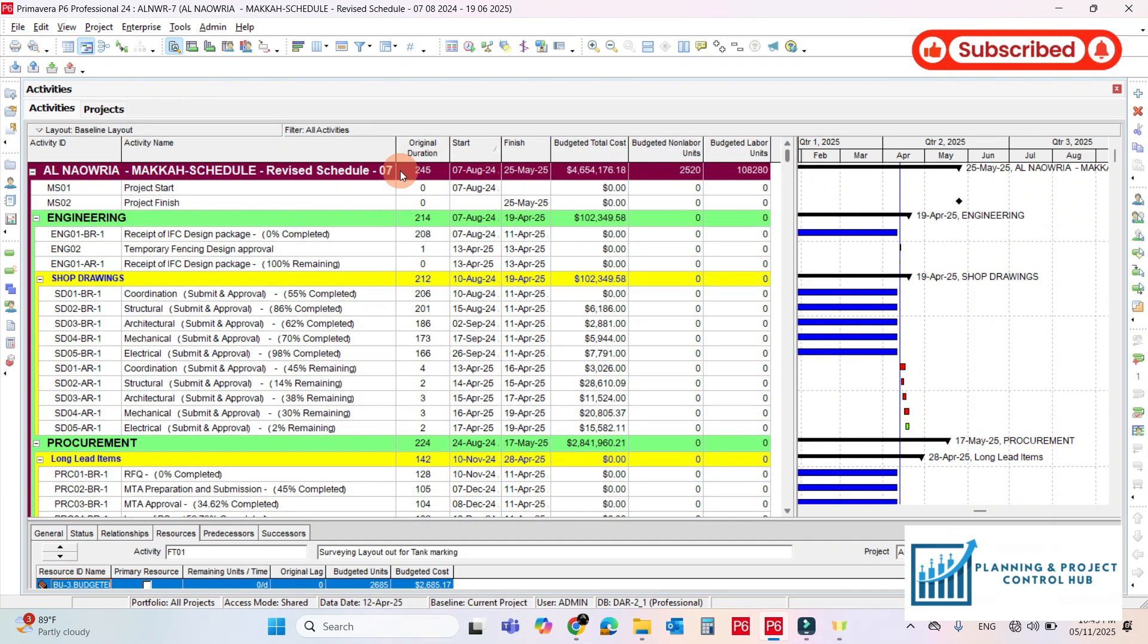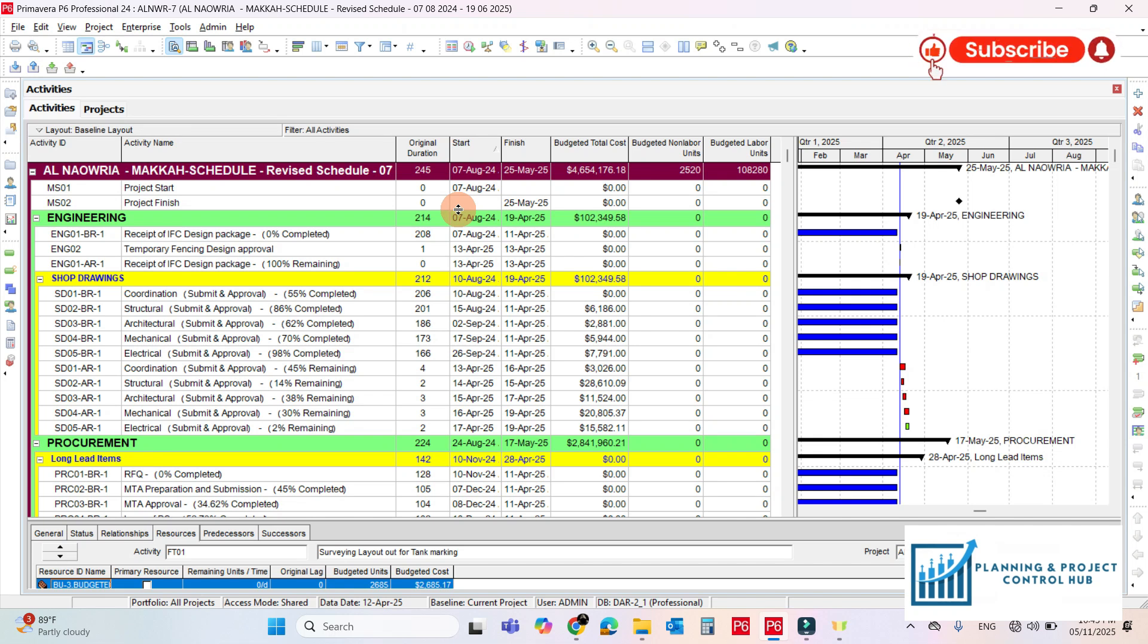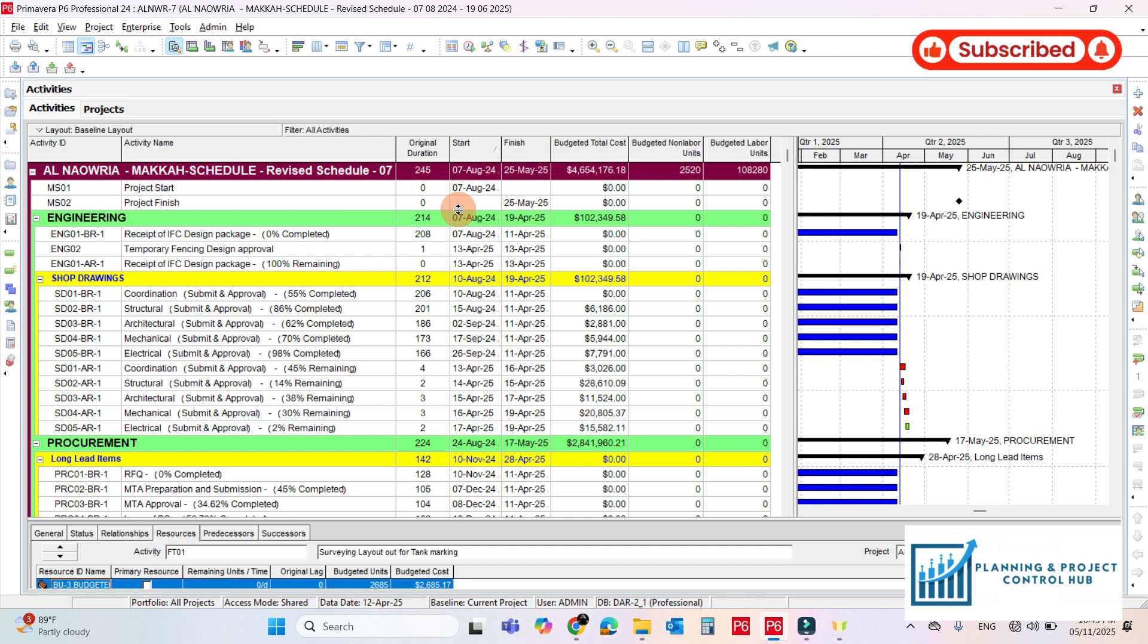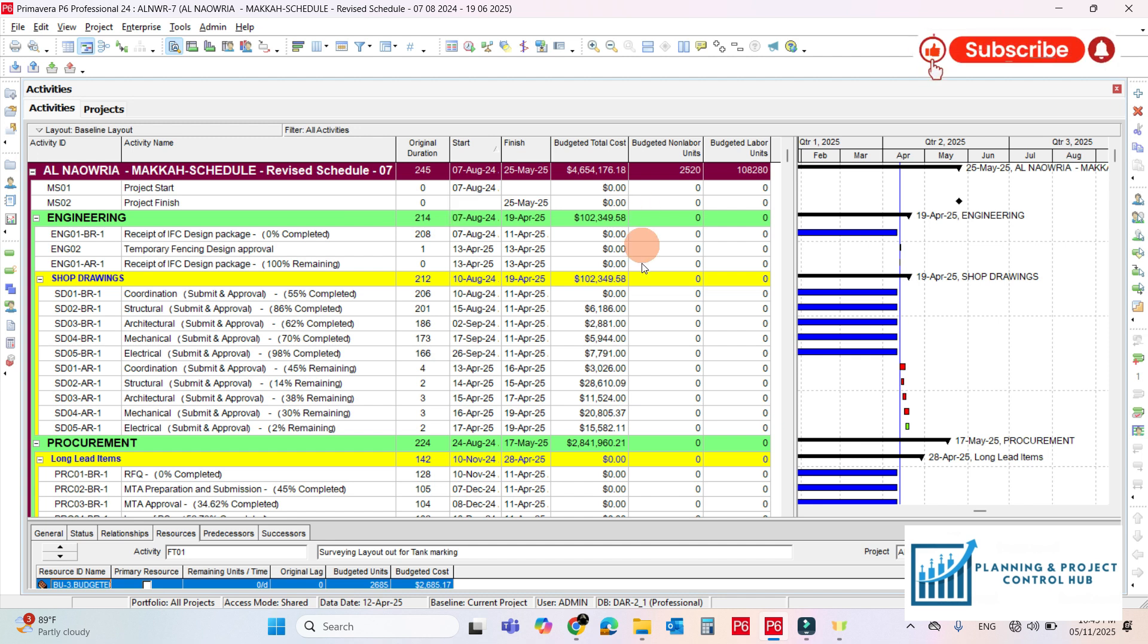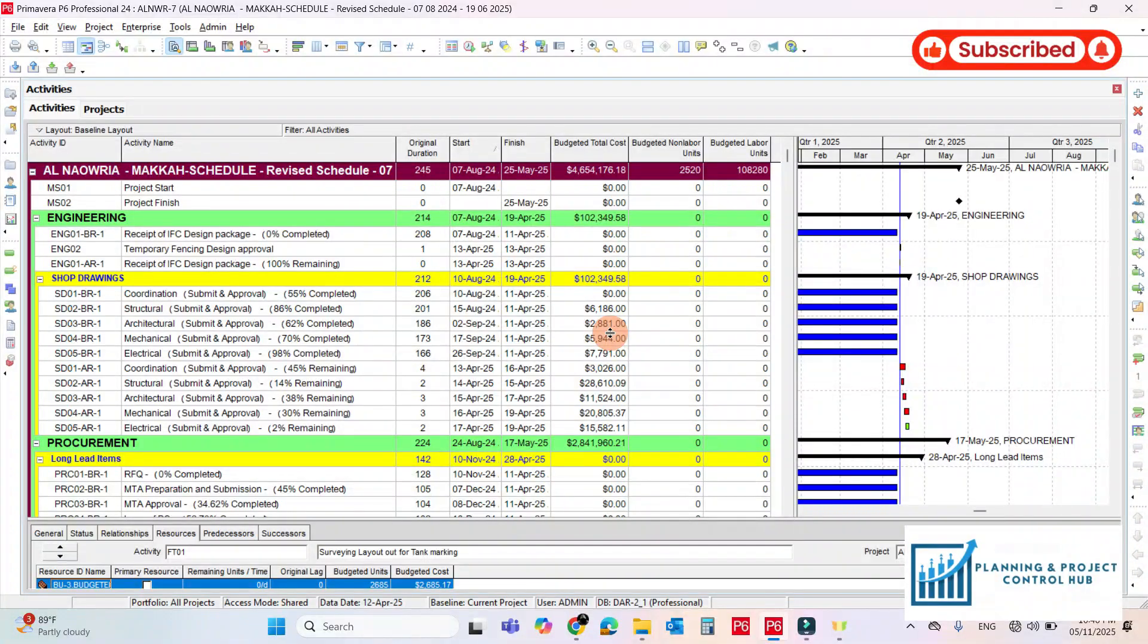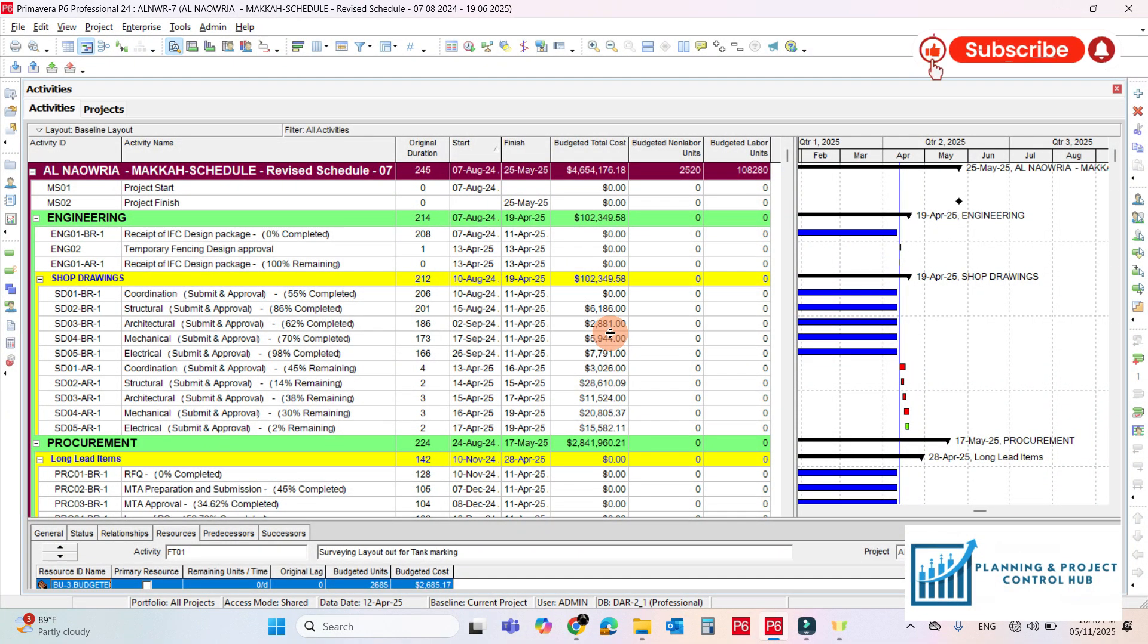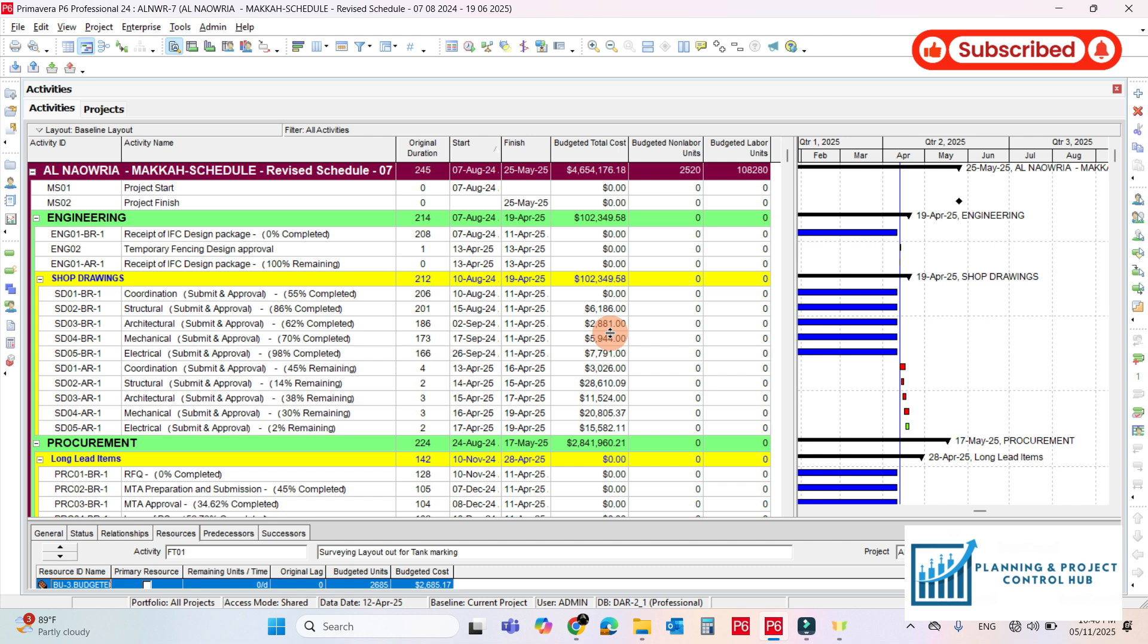If you see here the duration is reduced from 254 to 245 because there are very few activities which have the status of not started, as this project is already ongoing and very few activities are left. So by this way we can reduce the duration using the global change function, very easy and it's very time saving.